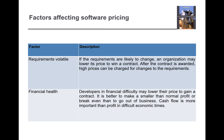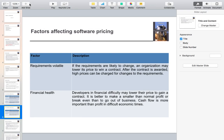The fifth factor is financial health. A developer in financial difficulty may lower their price to gain a contract. However, it is better to make a smaller-than-normal profit than to go out of business, because cash flow is more important than profit in difficult economic times. Instead of quoting low, getting the project, and then facing a financial crisis, the developer should maintain a nominal profit and keep cash flow stable.